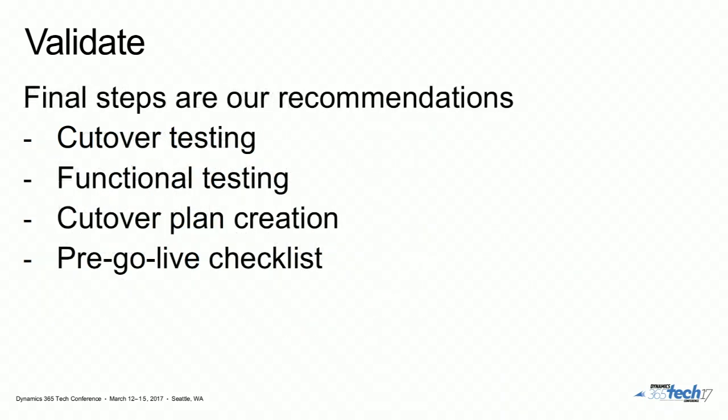Now, the final steps are really nothing to do with the software, they're just process. Cutover testing, you know, as soon as you've got a good data upgrade run, you should start doing your cutover iterations. What I mean by that, in case people use different phrases, is practicing the data upgrade over and over again until it runs within the downtime window that you have. Obviously, that doesn't happen in all cases. The data upgrade is actually not as bad as one might think.